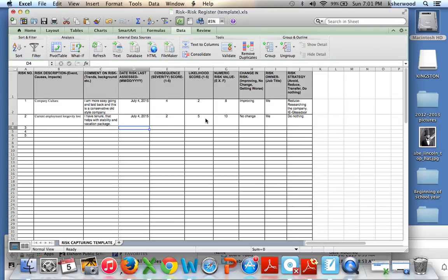When chronologically did it occur in the project plan? How severe would it be if it happened? How likely is it to happen, etc. So you're going to go through and list out all of the project risks associated in the case study, and fill it out just like you did for your job change assignment. Hopefully that gives you an insight into how the risk register works.